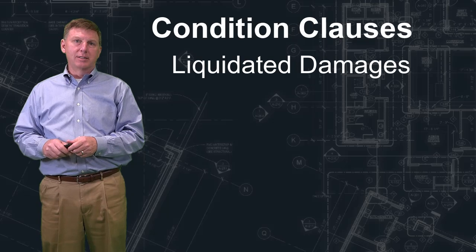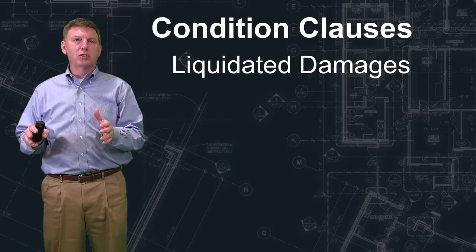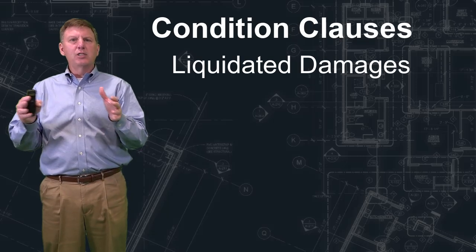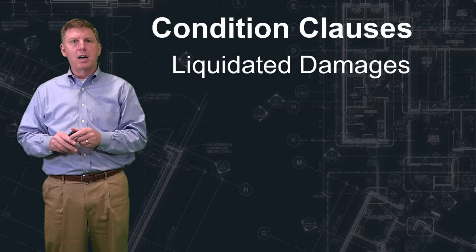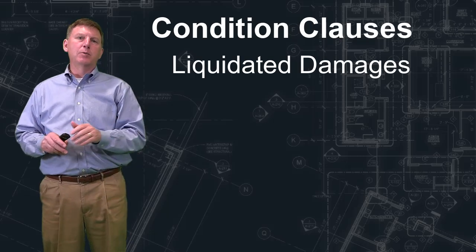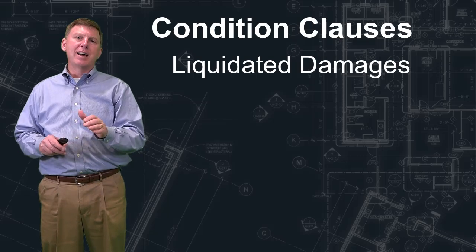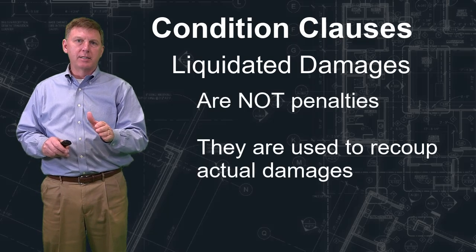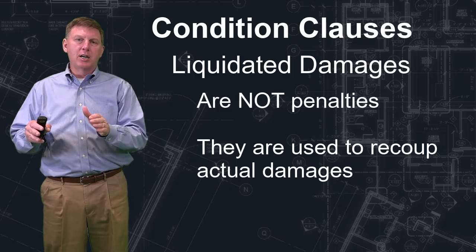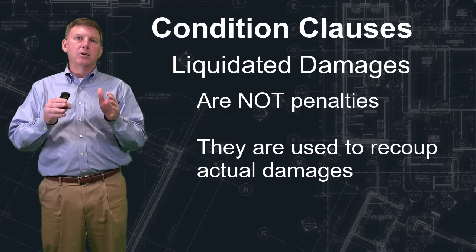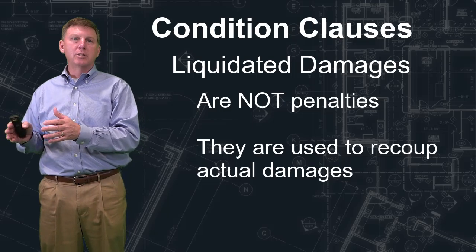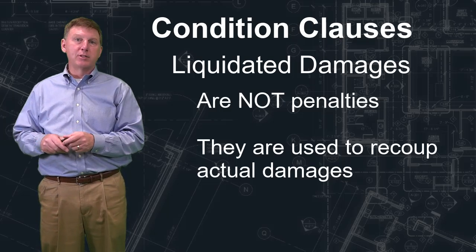Liquidated damages. So this is a big term in construction. And it often applies to projects that have a sense of urgency to get done by a certain time. One thing, if you remember nothing else about liquidated damages, you should remember that it is not a penalty. Owners don't apply liquidated damages to penalize contractors. Owners apply liquidated damages to recoup money lost due to a schedule being missed.